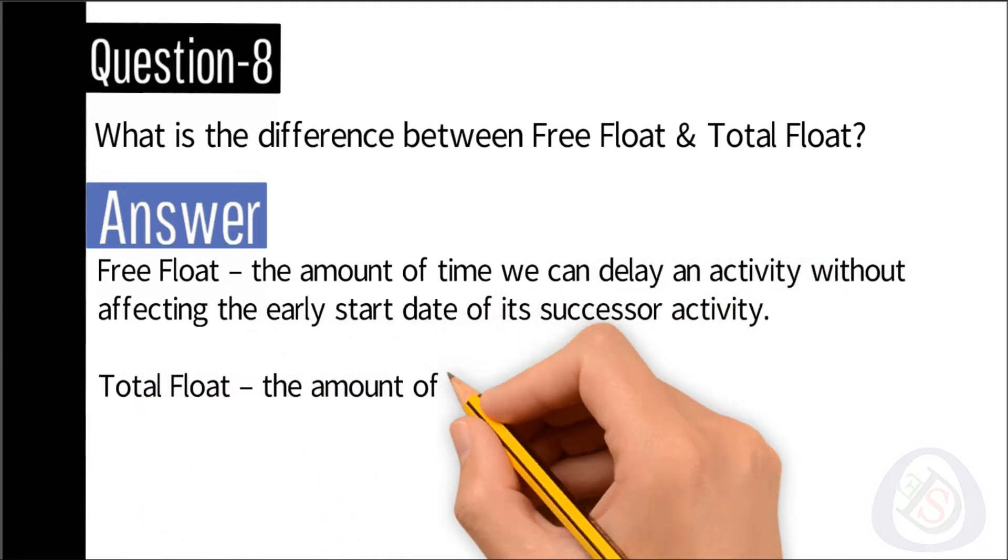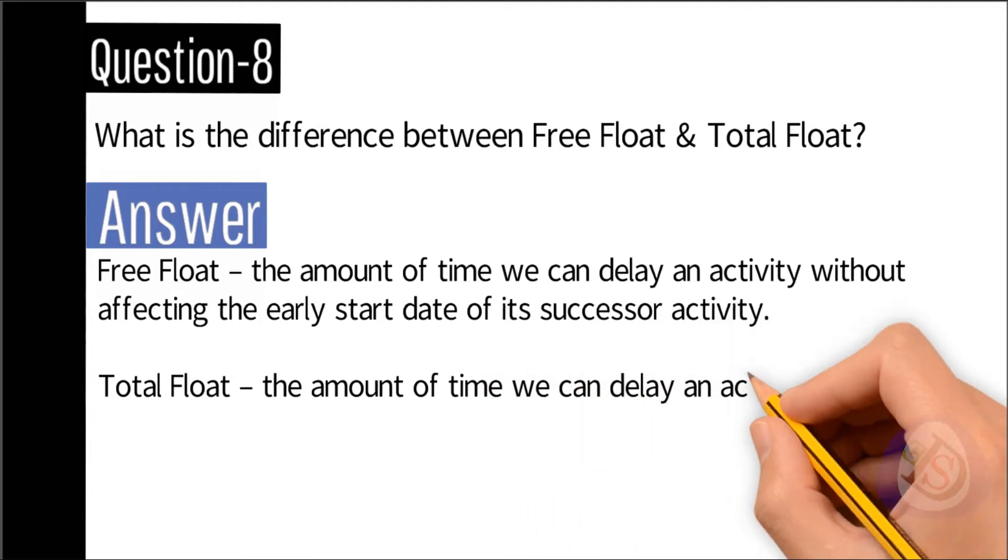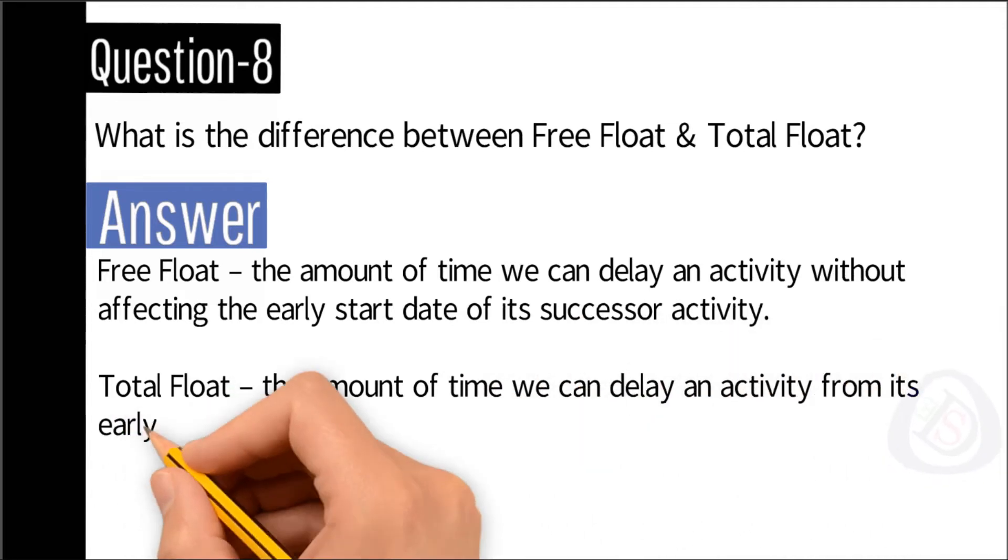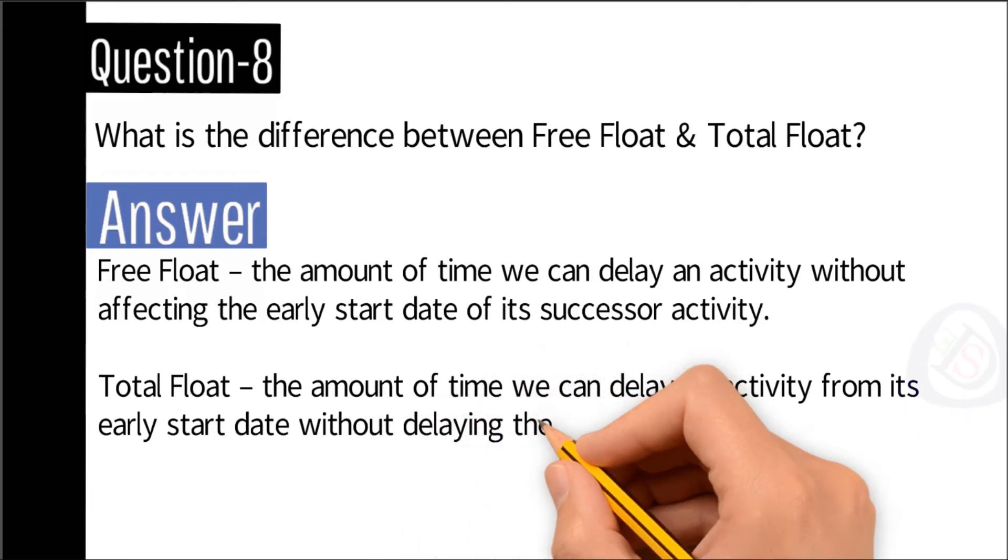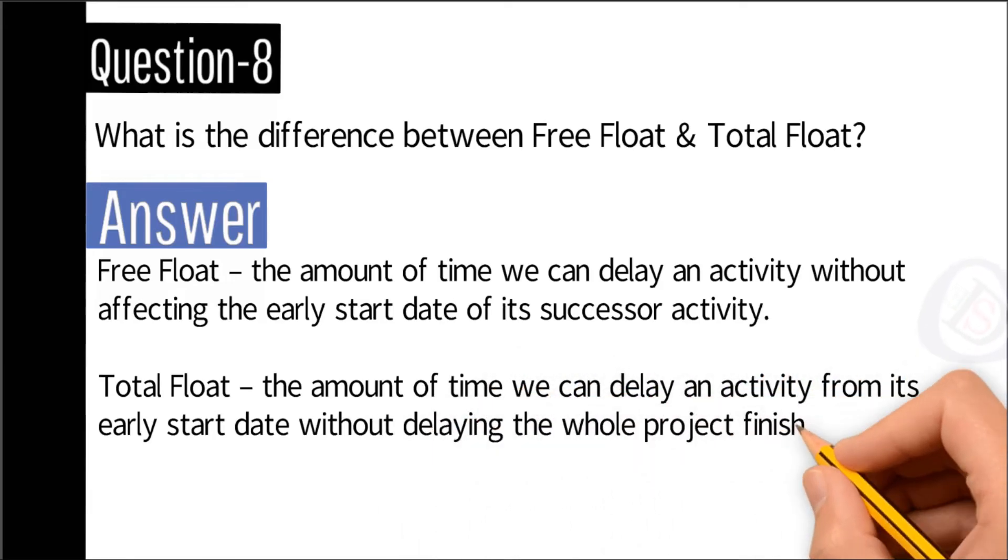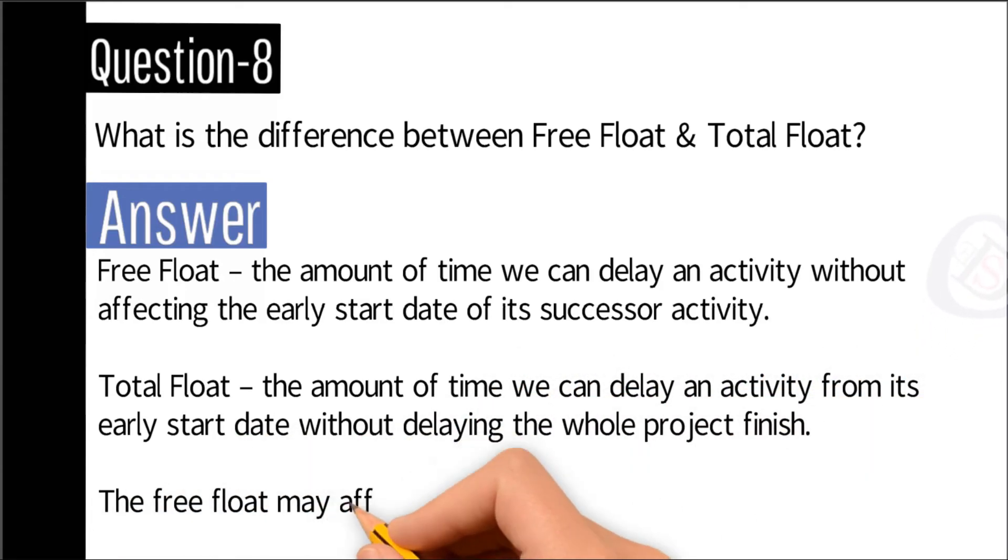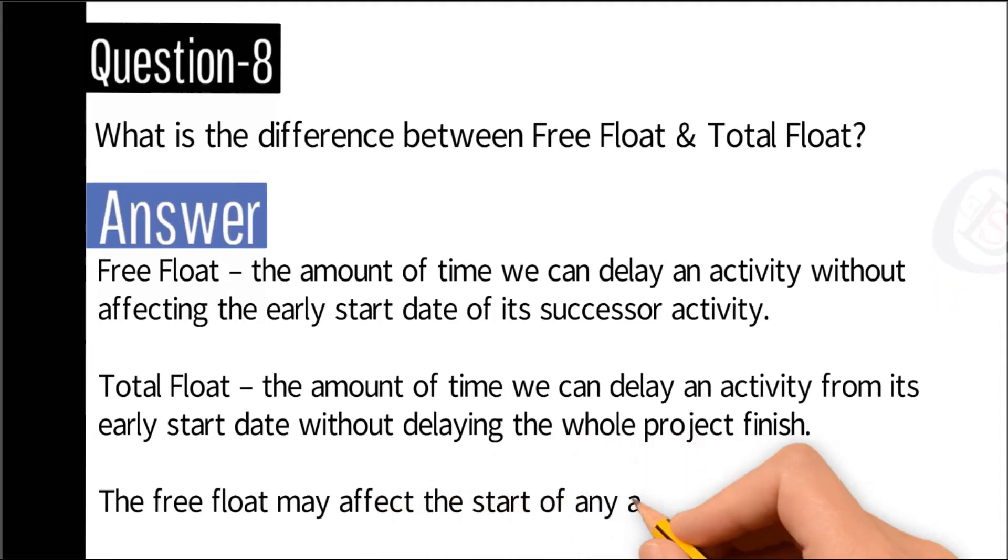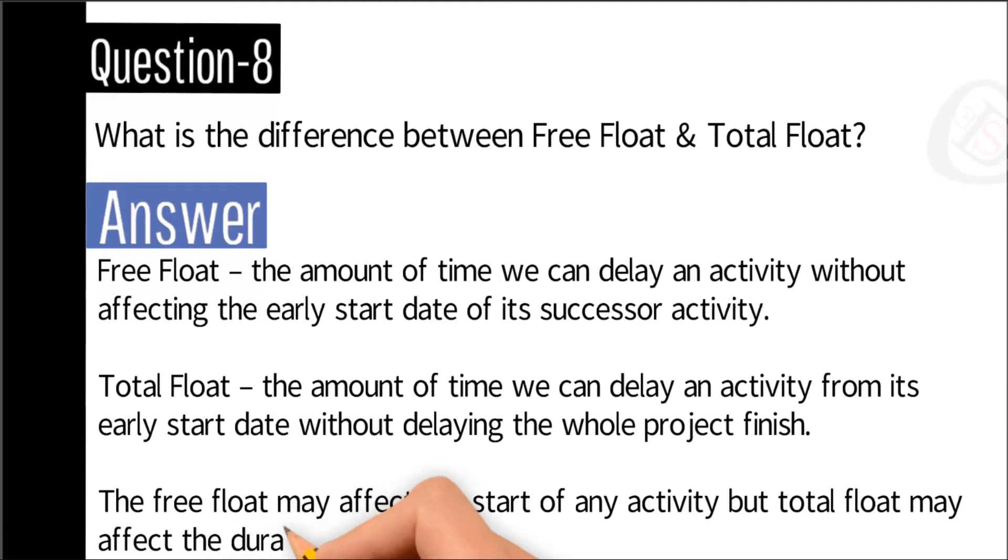Total float is the amount of time we can delay an activity from its early start date without delaying the whole project finish. The free float may affect the start of any activity, but total float may affect the duration of the overall project.